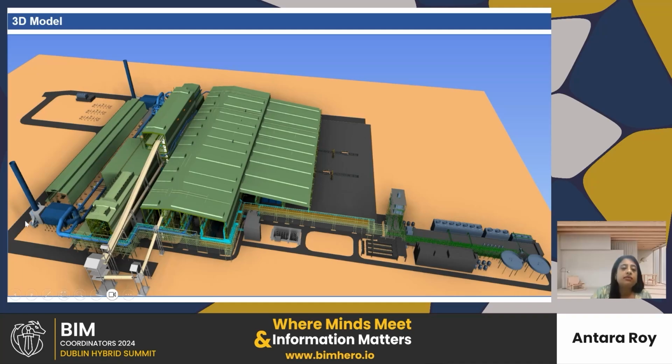And the digital movement: how my resource is moving from this road to this road, because this pipe rack needs to be okay. Already this structure is completed. In this process of model preparation, we followed the 30, 60 and 90% model setup. What is 30%? Where I don't have any detailed data, but I need to prepare a model for understanding.